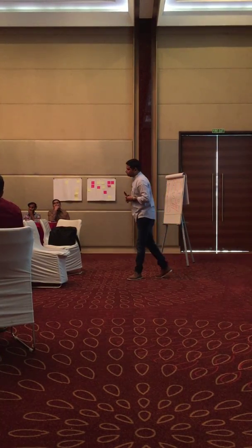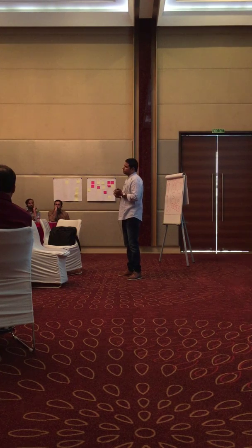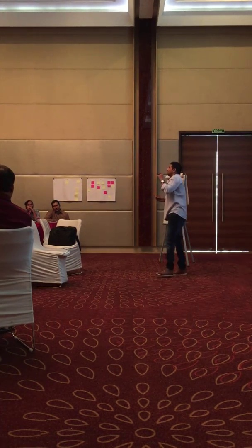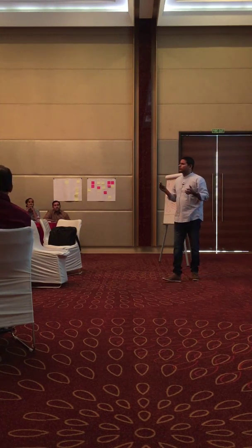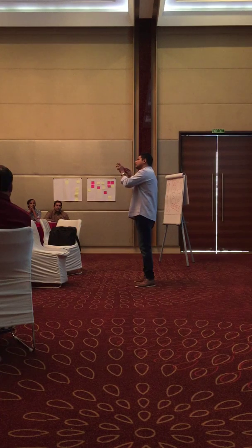One story can have multiple tasks that will cover the development cycle. Suppose login is one story. If you pick it up into a sprint, during sprint planning part 2, which we will discuss in more detail, the team will come up with: I need to analyze, which may take 1.5 hours, I need to do some UI, I need to do some back-end stored procedure, I need to do some testing, I need to do some bug fixing. All these things together individually will take some effort.